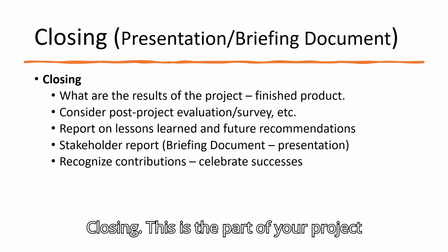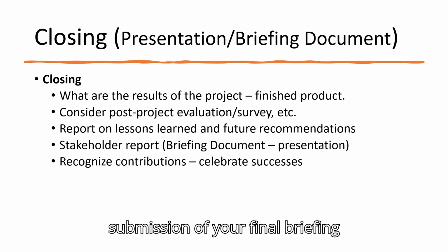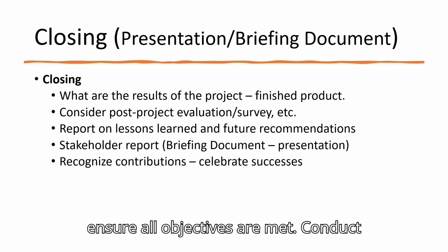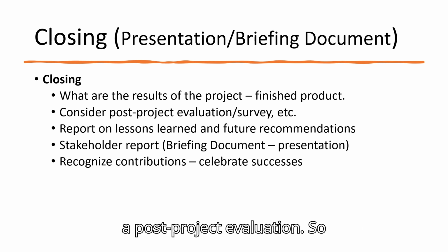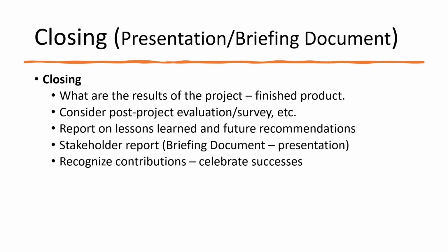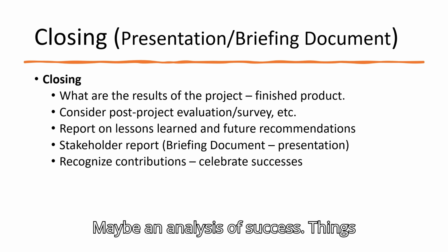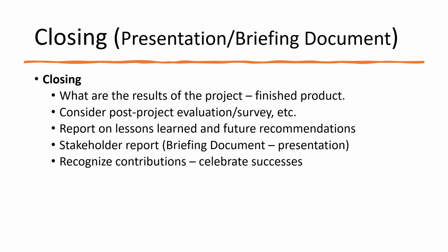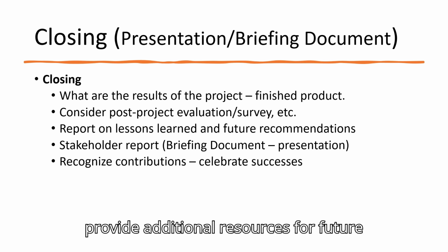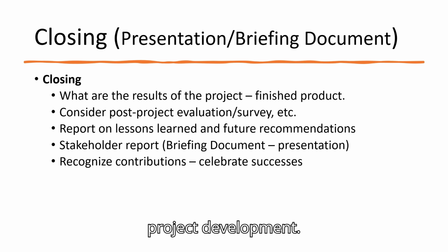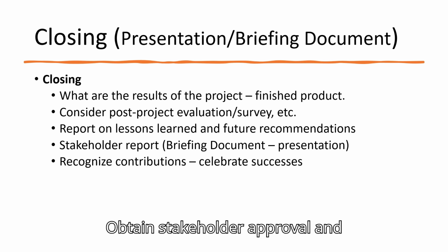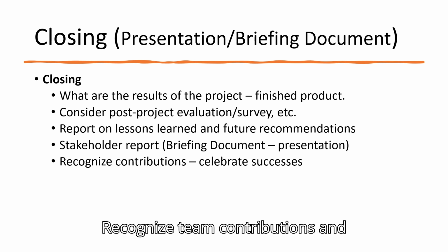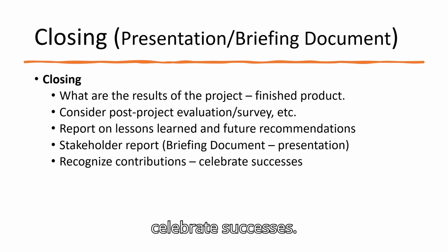Closing. This is the part of your project that relates to your presentation and submission of your final briefing document. Complete final deliverables and ensure all objectives are met. Conduct a post-project evaluation. So, what were the lessons that were learned? Maybe an analysis of success, things that you might do differently. Document outcomes and archive project materials. Ensure passing on information that would provide additional resources for future project development. Obtain stakeholder approval and officially close the project. Recognize team contributions and celebrate successes.